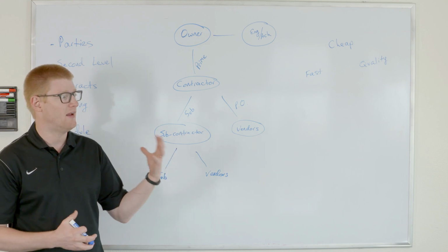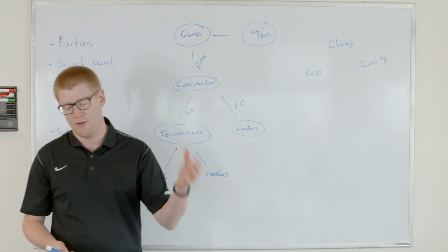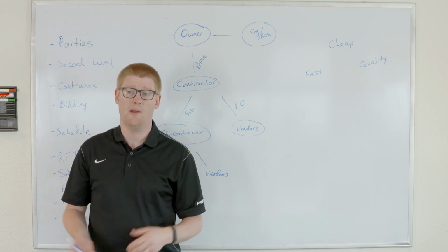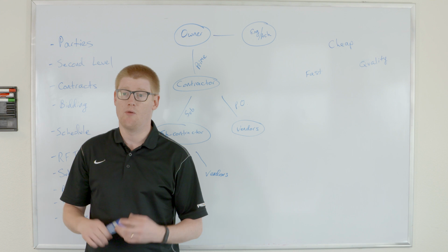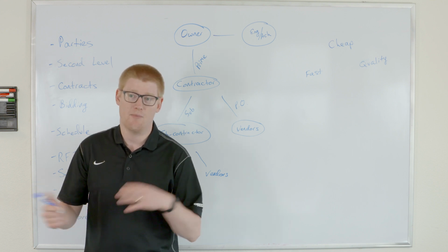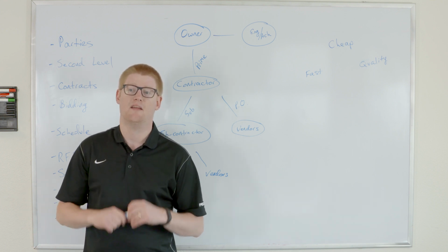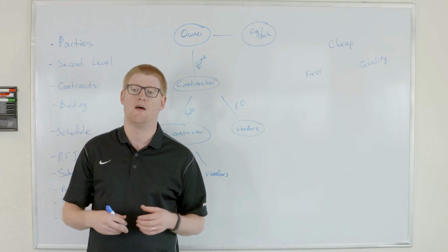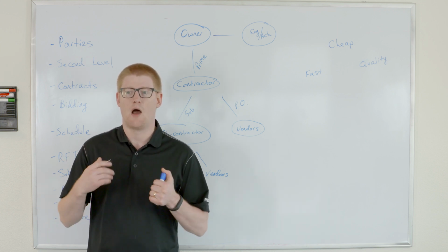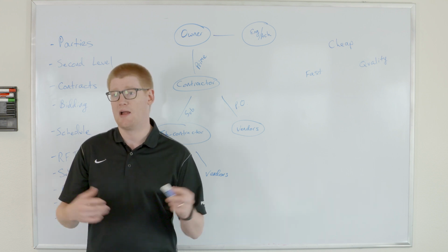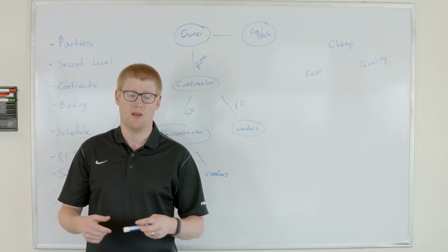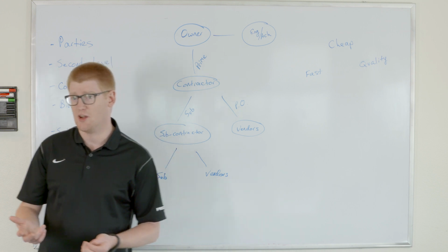The easiest way to explain it is looking at, if we were to build a building, we could come in, hire 100 people to come and pour all the foundations at the same time, and then send them home for a week while we wait for the concrete to dry, and then bring them back and have them do the slabs, and then send them home and wait until the steel guys get done so they can go to the next floor. But it's not practical for you to actually do that. From a manpower standpoint, to lay off people, pick them back up, it's very expensive, it's time consuming. And it just doesn't necessarily make sense.